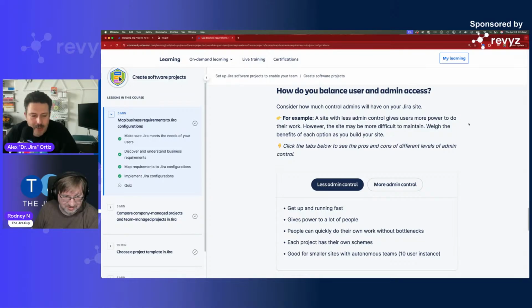I get that there's a balance between, hey, we need data to make a decision. But there's different ways to make fields required. You can make them required upon inception, where you might know things like the title, but you might not know the due date or the priority right away. But through the use of workflows, you can then make fields required later in life. I think that's very critical, and I don't think a lot of people know or can appreciate that.